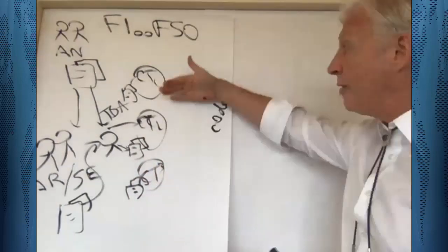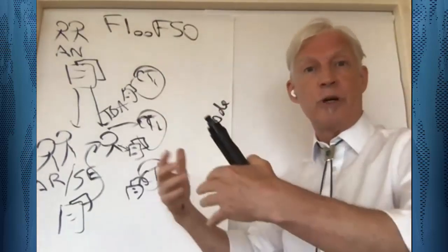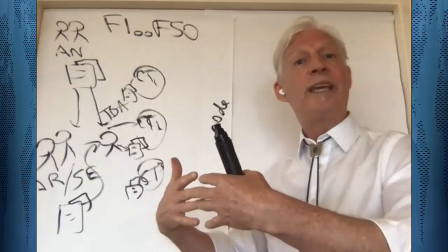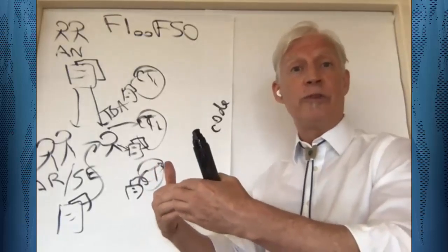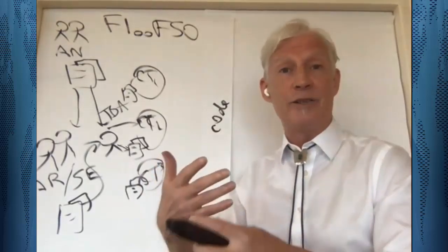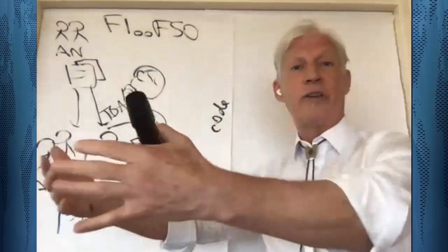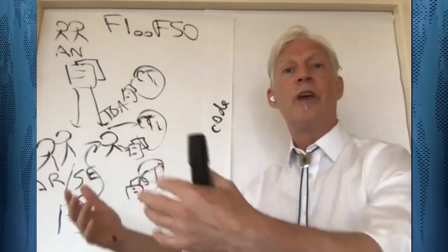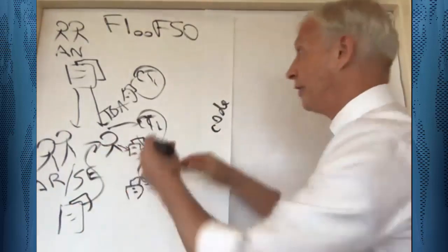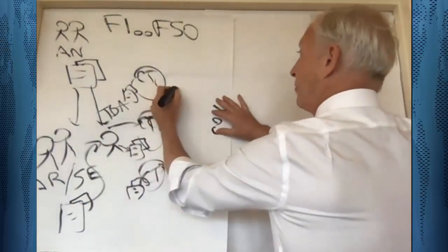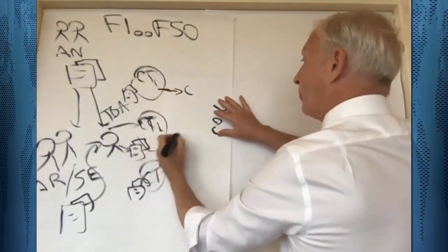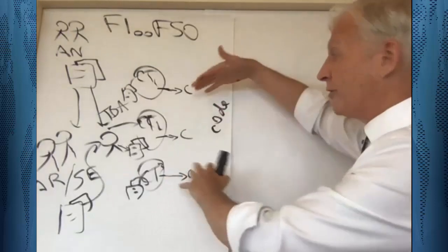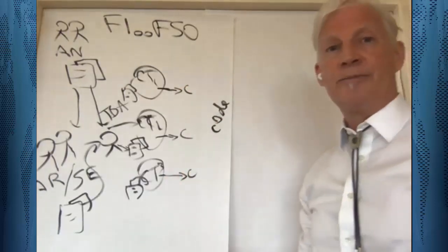But because code here is being done asynchronously, the different parts aren't actually lining up and can't be linked together, so we can't do continuous integration. We have to do delayed integration until finally at some point in the future, like after a long period of time, like 2 or 3 months, the code is all in place and then we integrate it together. So this, therefore, is a more realistic visualization of the picture, which is that there's delayed integration of the code.